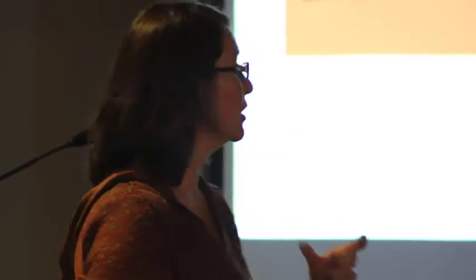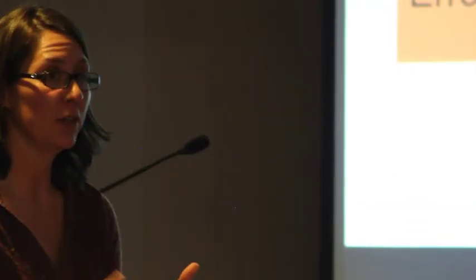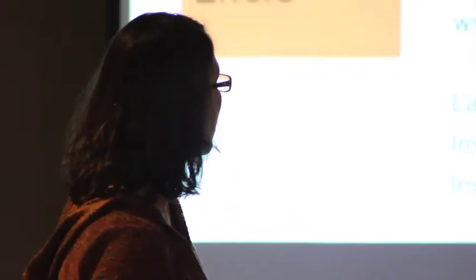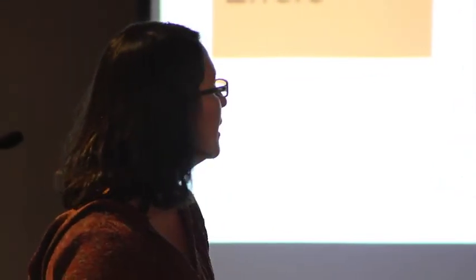It tells what you said you would do. So if you're going to change any practices, change your SWIP. If you don't want to do them every 7 days, then you need to get into your SWIP and amend it and say, I'm doing them every 14 days and after precipitation events. It has to meet your SWIP and it has to meet the basics of the permit.